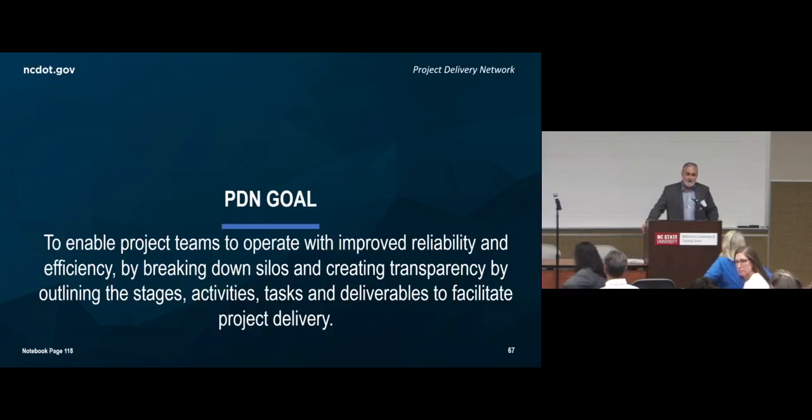So there is a new MS project schedule template, and it has been updated, and it now includes the predecessors and the successors. It includes the DOT and PEF roles. It includes durations. All this is just kind of built together. So when you develop your scope, you need to go into it and kind of reconnect everything to match what your scope is. But the idea was to put everything in it instead of giving you the basics. We wanted to add it all in there so you could just rebuild it.